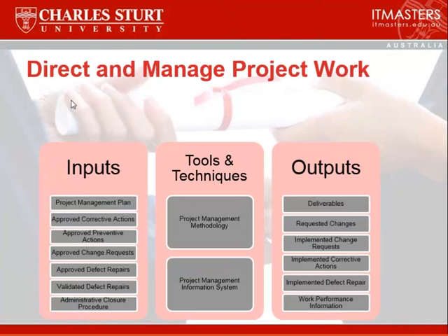Moving on to the next process, which is as you're up and running with the project, you direct and manage the project work. So essentially you're following what's already set out in the project management plan. And the first input is the project management plan. And as you're going through the project, you'll have corrective actions that need to be taken, preventative action, change requests, defect repairs, etc. You use your methodology to help you to understand how you direct and manage the work, use your information system, and these are all the outputs from your direct and manage project work.